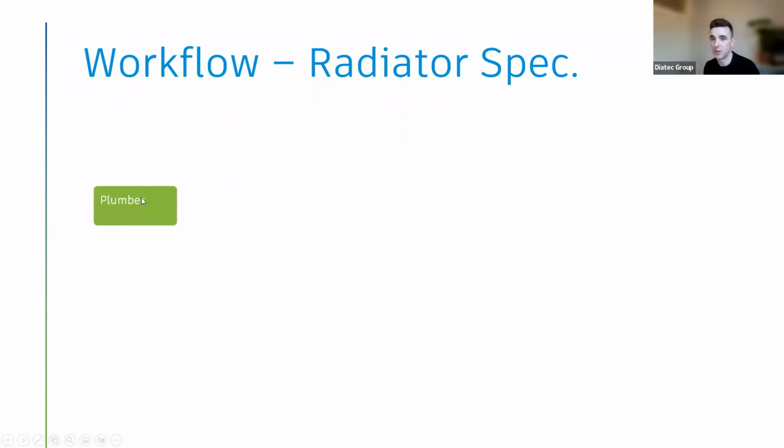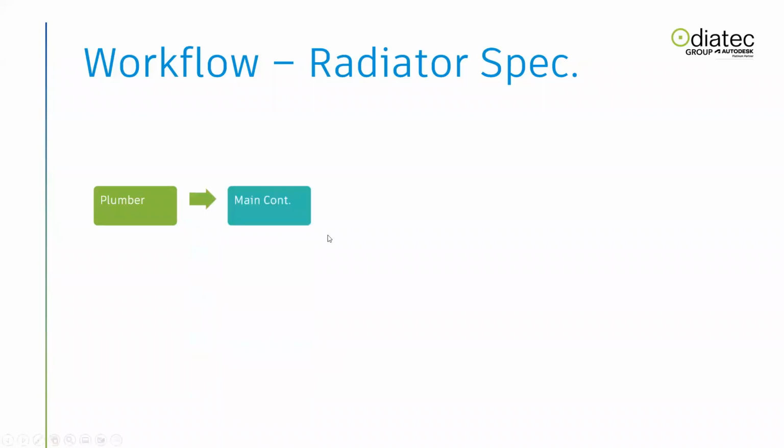get more information from a designer. They put through a request effectively for a piece of information, an RFI. The process of how that works inside Autodesk Construction Cloud is that it's generated by potentially the person on site, using a mobile app or mobile device or tablet or anything like that. It goes to the main contractor, which has a role designated to them in the platform.